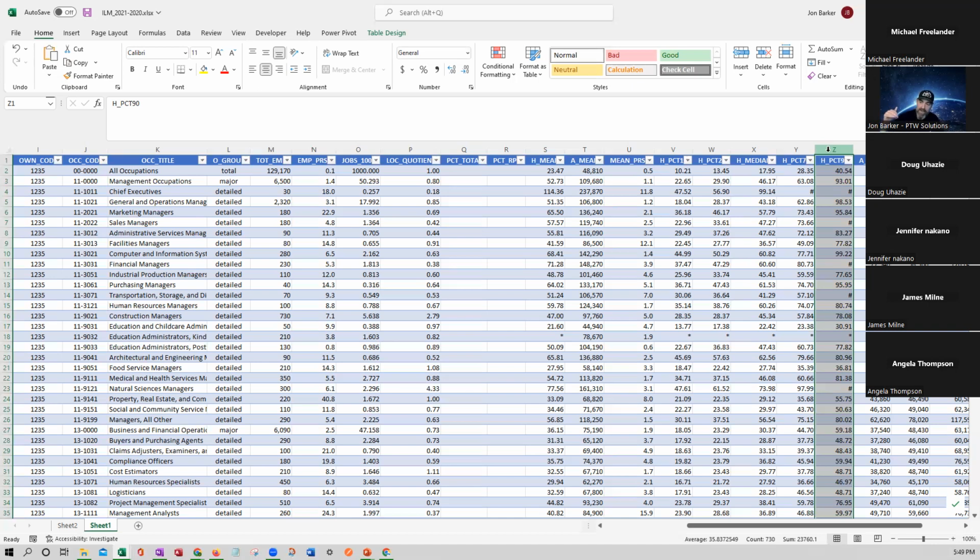And when you're putting all these things together, it's important to know what that top line is. Because again, I see so many companies going after work where their average rate, fully burdened for their average person, say makes 85K, is $120 an hour. And they're going after work where, if I look at the previous prices paid through FPDS or USAspending or SAM.gov, I'm like, these historical prices paid on average were like $60, $70 an hour. And I'm like, you shouldn't bid. You will not be competitive.